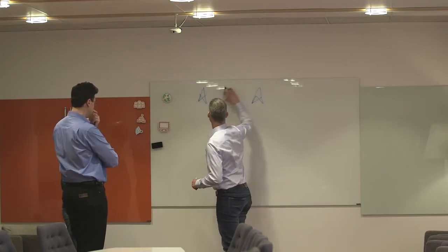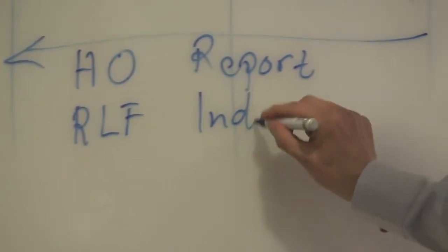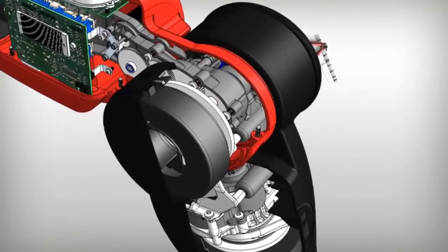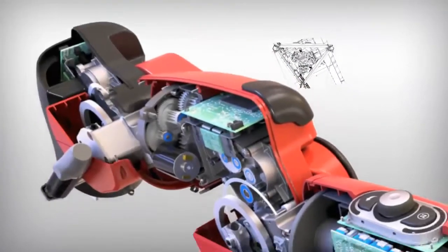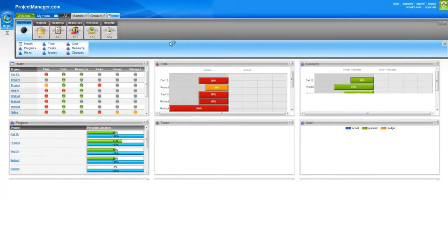In each sprint, there is a design phase in which the team is collaborating and defining the design for the sprint's functionality set. This part of the sprint is the most collaborative and can require a lot of meetings. Once those requirements are defined, the development or build phase should be free of disturbance. Automated tools are recommended to monitor status, allowing the team to focus on development.